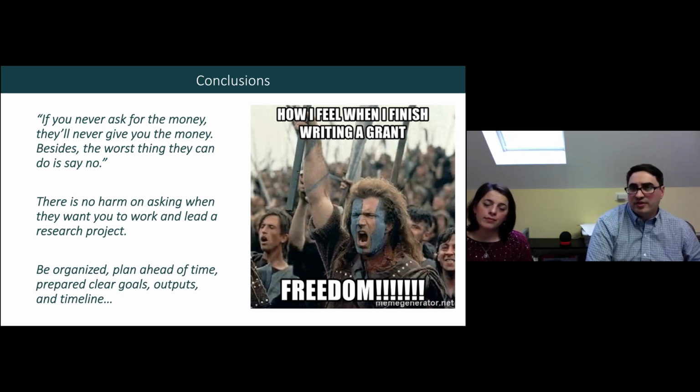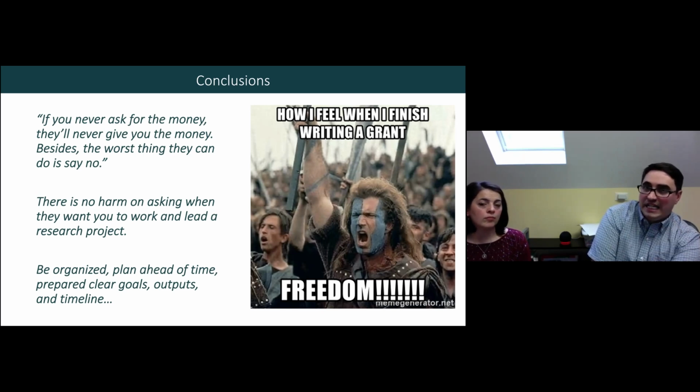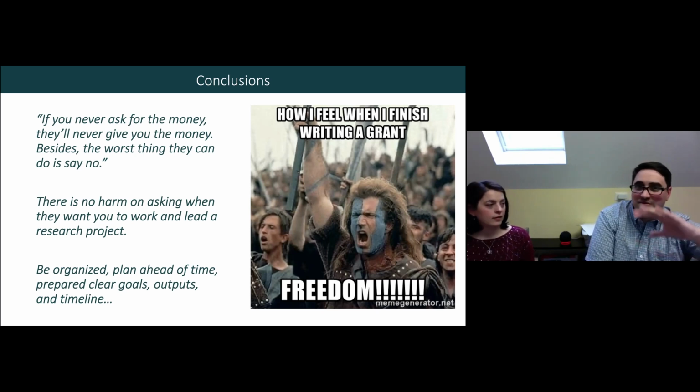At least from my experience, for example, I usually write at least 1 or 2 proposals per month, and then collaborate on many others. But I usually communicate with the pre-awards specialist and my college grant specialist at least a month ahead, and I tell her I'm planning to submit. In this case, I'm saying her because it's another person. I'm planning to submit a proposal, and it will be due on May 24th. And I already told this person today that I'm planning to submit a proposal, and we will have probably 2 or 3 co-PIs and maybe 13 collaborators from the entire US.